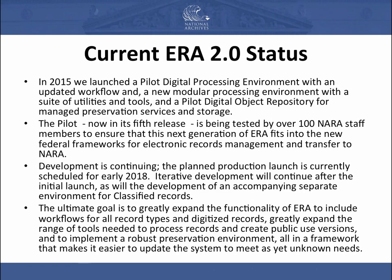We are in phase five of the pilot now and will be releasing to production in early calendar 2018. This will be for unclassified records. It will take about a year and a half to do the classified instance. Cloud implementations rated up to FISMA High for sensitive records allow us to process Title 13 and Census records with PII in the cloud, but we haven't yet accessed a cloud environment supporting top secret, SCI, and all compartments of top secret and SCI. However, the architectures and tools we're building, even Amazon tools like Elasticsearch, are built so we can pick them up and move them into an on-premise private cloud if needed when we begin developing the classified environment.